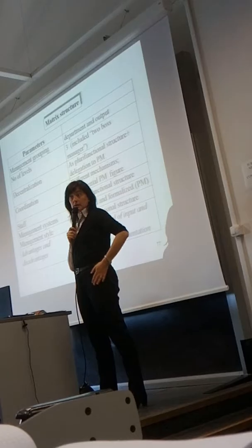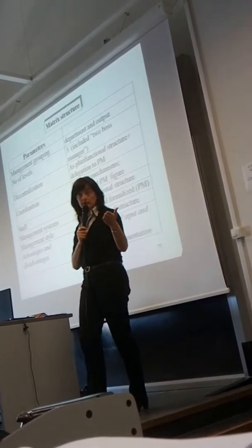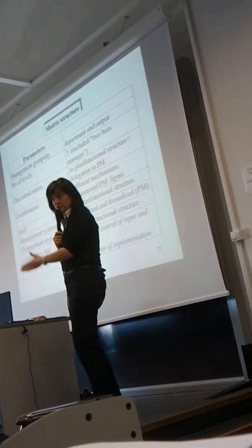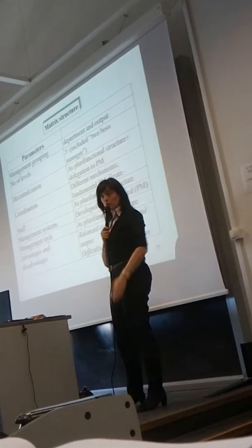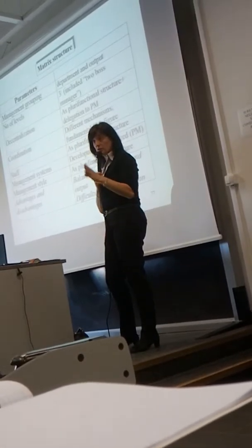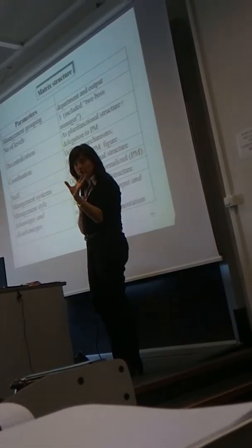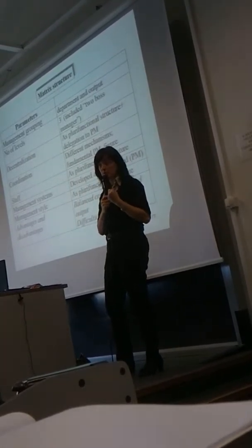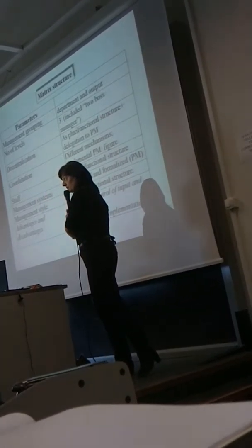No, okay? Because the customer for that company probably imposes the time, okay? So you have to finish the bridge within 1 year, or you have to conclude the tunnel in 6 months, okay? So that's why the management control is not based only on financial parameters, but also on non-financial parameters that especially are time and quality, okay?